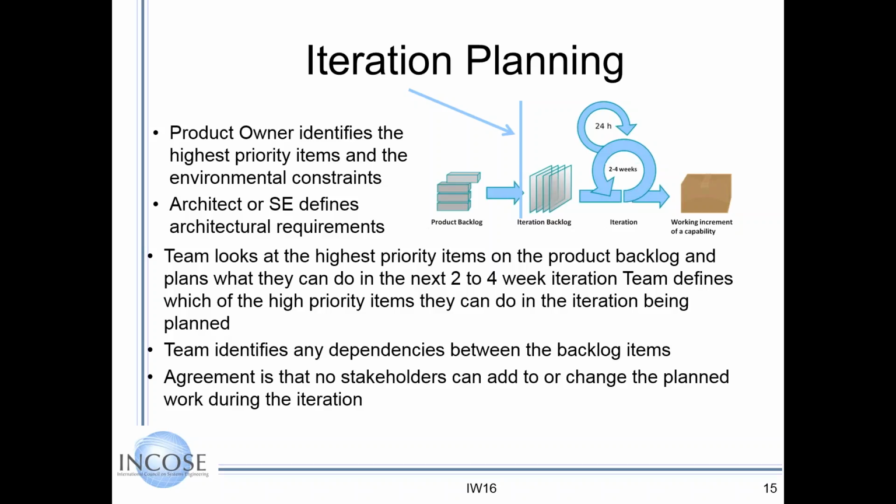In my industry, there's shoulder tapping: no, oh, by the way, or could you just stop that? So when you plan, you stick to that plan. You've got something demonstrable, and at the end of the 2 weeks, you then look at the next 2-week plan. And there's huge value in that: the team makes a 2-week plan and they stick to it.